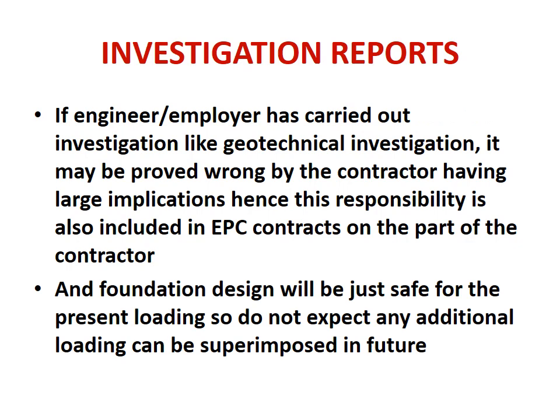Let us talk about the investigation reports like the geotechnical investigation report, etc. If the engineer or employer is providing such reports along with tender documents and they are binding, then it becomes difficult. Suppose there is a provision that the EPC contractor will verify it, then you will find that there is a lot of difference between the report given by the engineer and the report of the contractor.